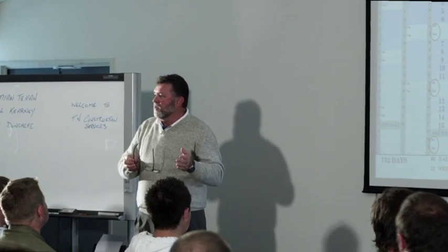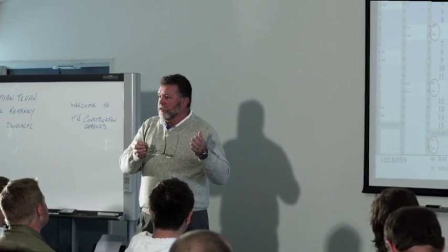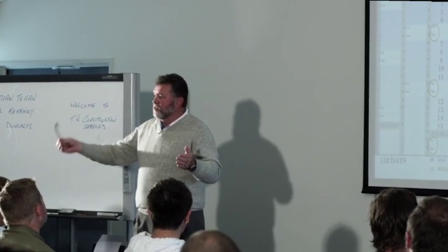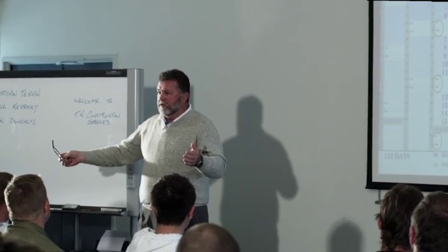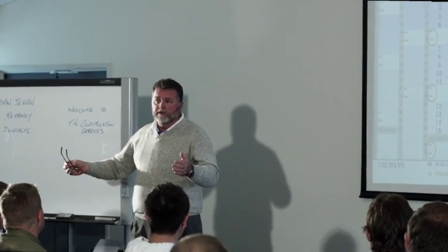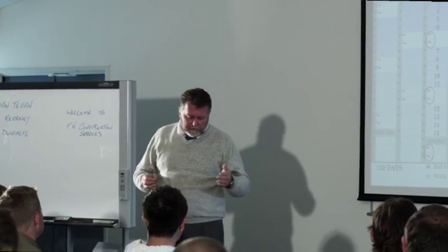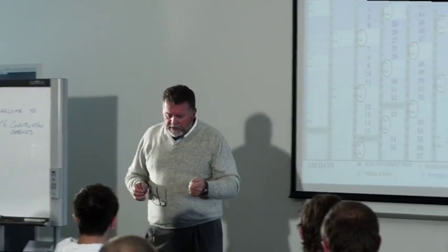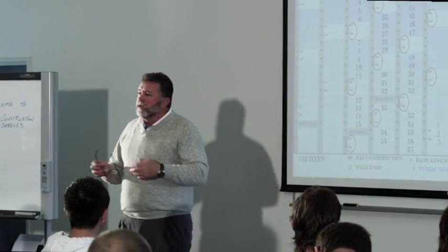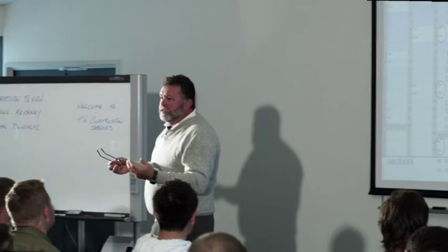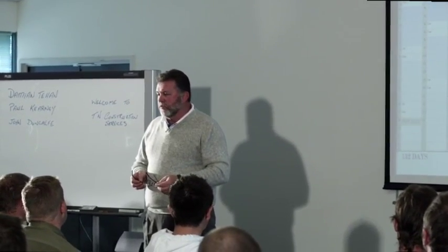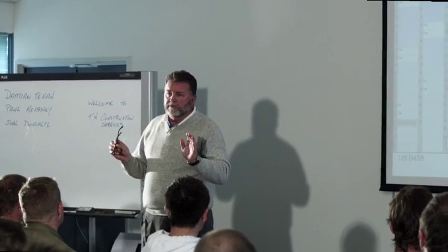So all of a sudden, something that might normally only take you, let's just say, 70 days, may go out to 235 days on your construction period. That's the construction period you've got. Now you need to understand this quite clearly. As Paul said earlier, part of the conditions in the contract, which we'll get to later, is liquidated damages. Now, the situation you've got is that you're saying to the owner, I'm going to build you a house within 235 days, as an example.